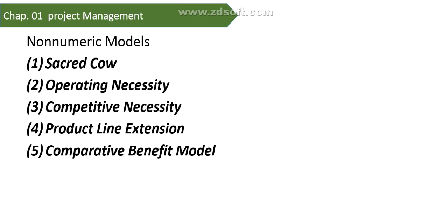Competitive necessity. In this case, the decision is to undertake the project based on the desire to maintain the company's competitive position in the market. Many business schools are restructuring their undergraduate and MBA programs to stay competitive with more forward-looking schools. Operating necessity projects take importance over competitive necessity projects.